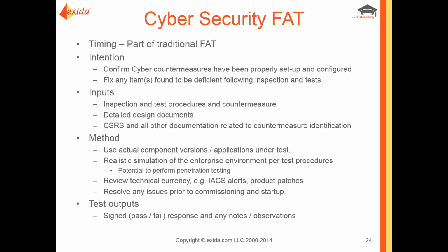Once again, resolve any issues prior to commissioning and startup. At the end, you'll have a signed-off document of the procedure with pass or fail, and any notes and observations that need to be sent forward as the equipment gets shipped to the site and dealt with.